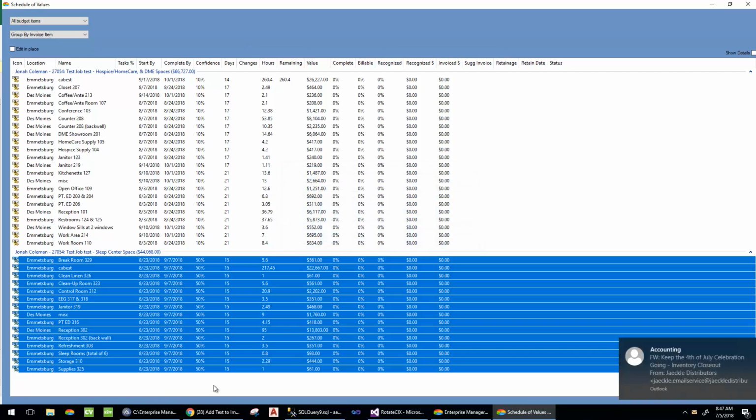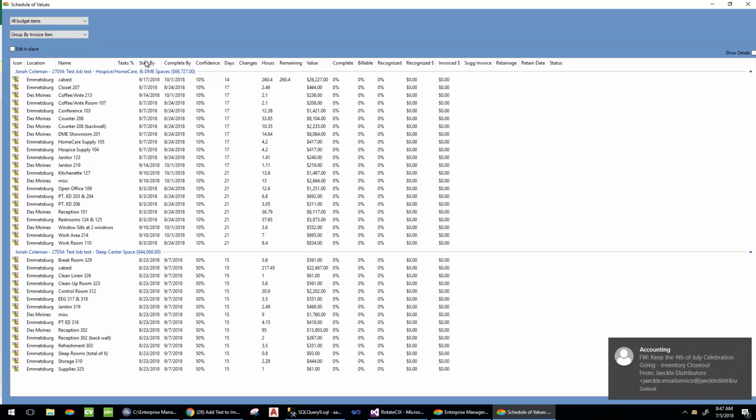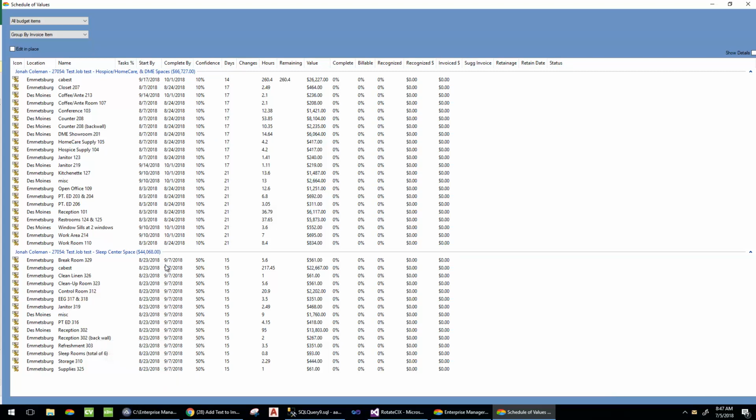And you'll see now we have a required start by date. So this is a management tool. If this work hasn't been released into the shop by this date, then we have a problem. Now, these working days is a number of calendar days that you could expect to have the product produced and available after you release the work into the shop.